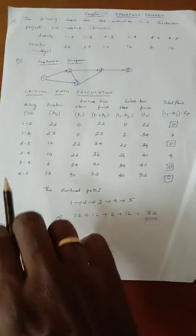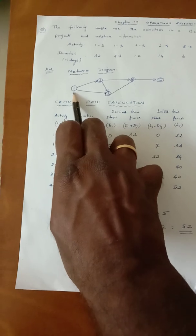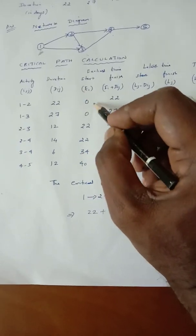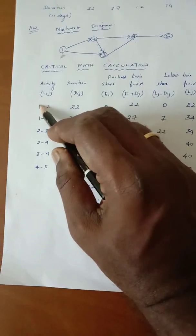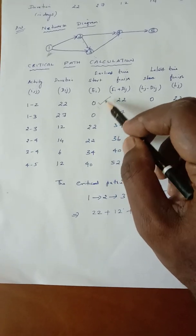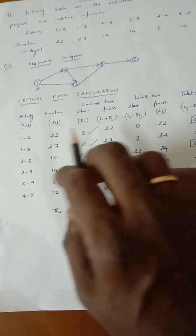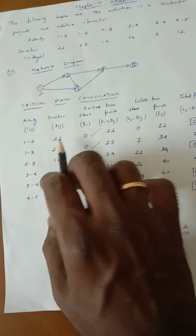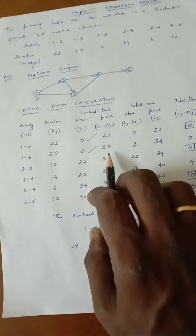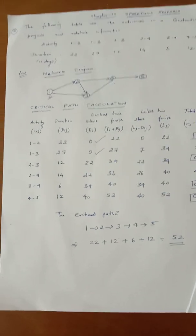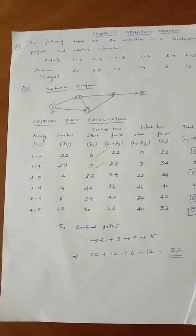For the forward pass calculation, the project starting node has start time 0. We compute earliest finish as Ei plus Dij. For activity 1→2: 0 + 22 = 22. For activity 1→3: 0 + 27 = 27. These are the forward pass left-side activities.